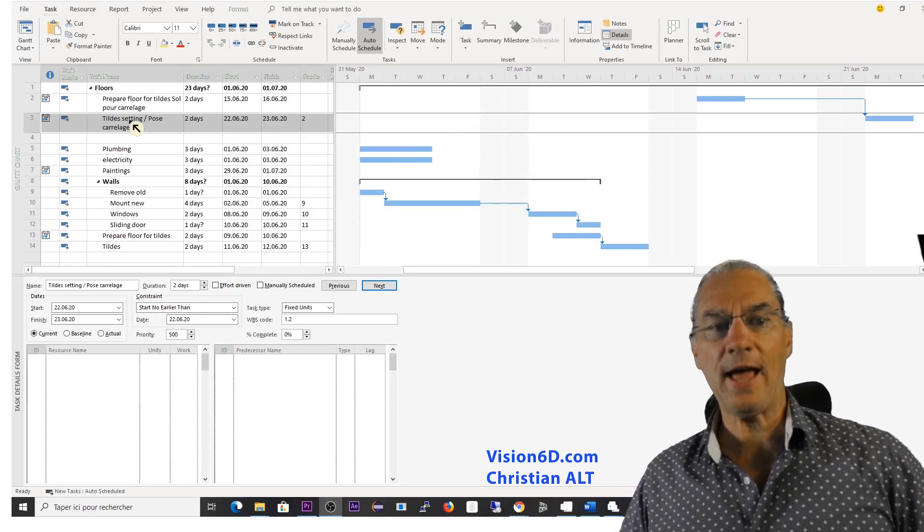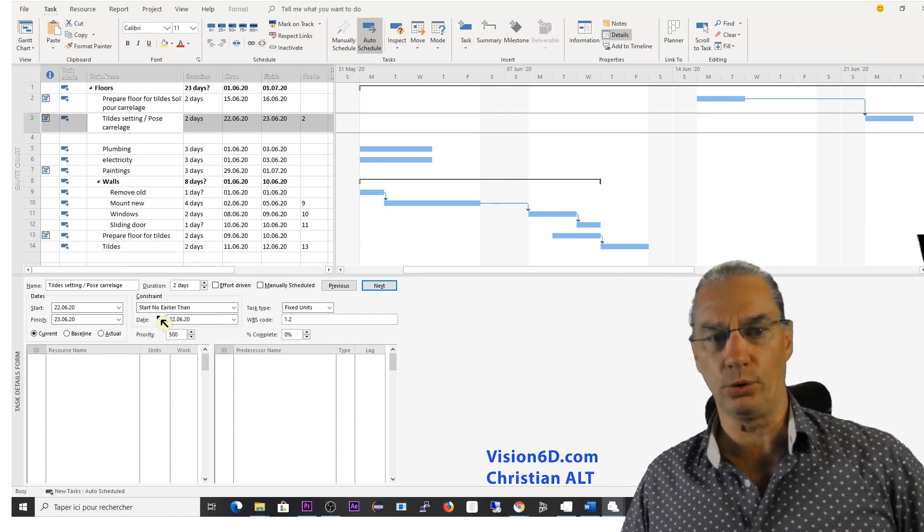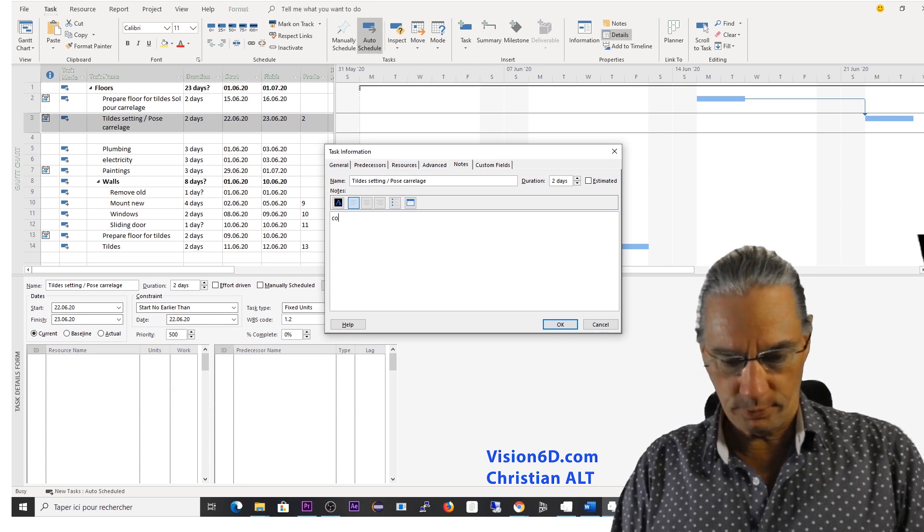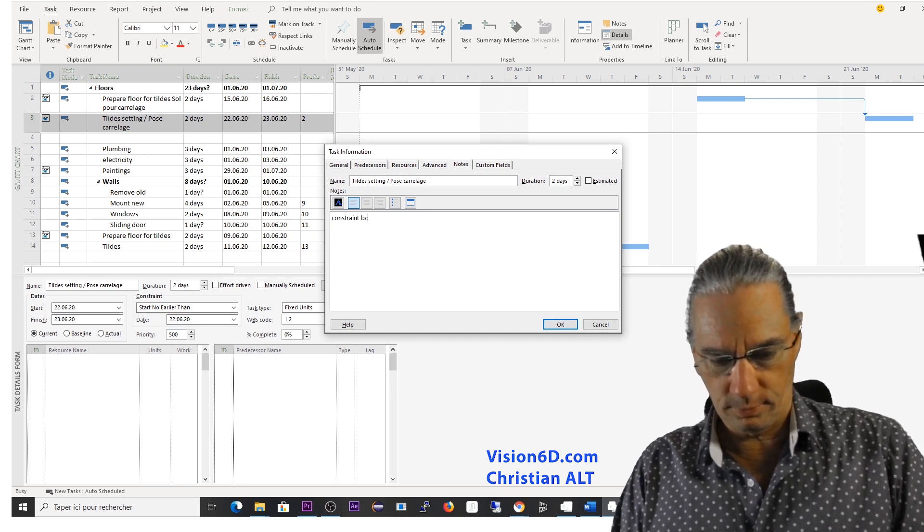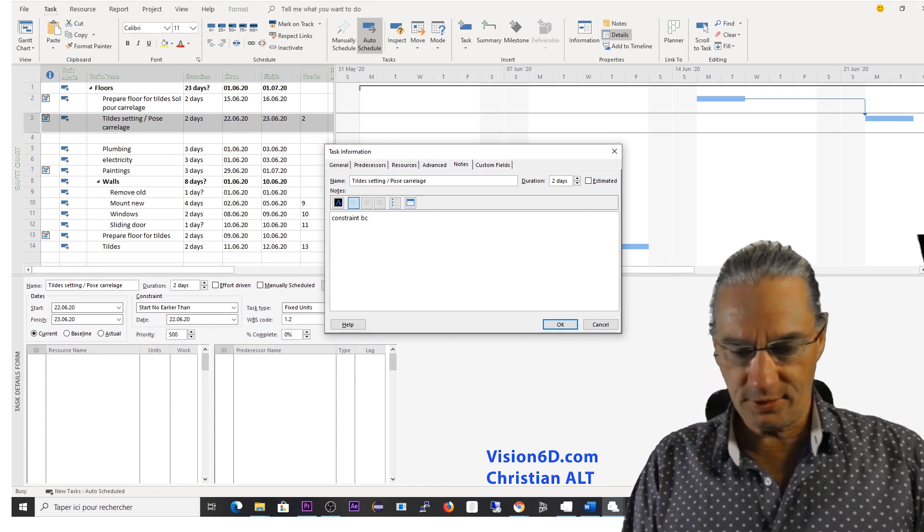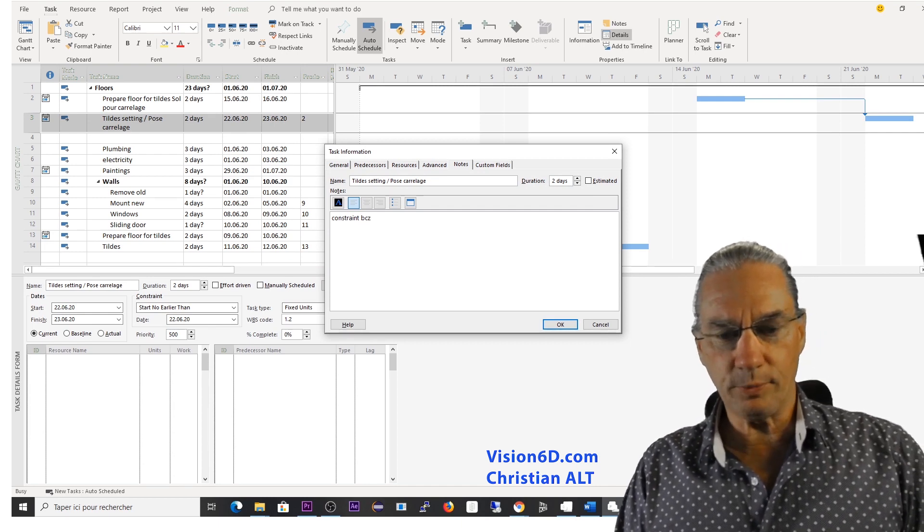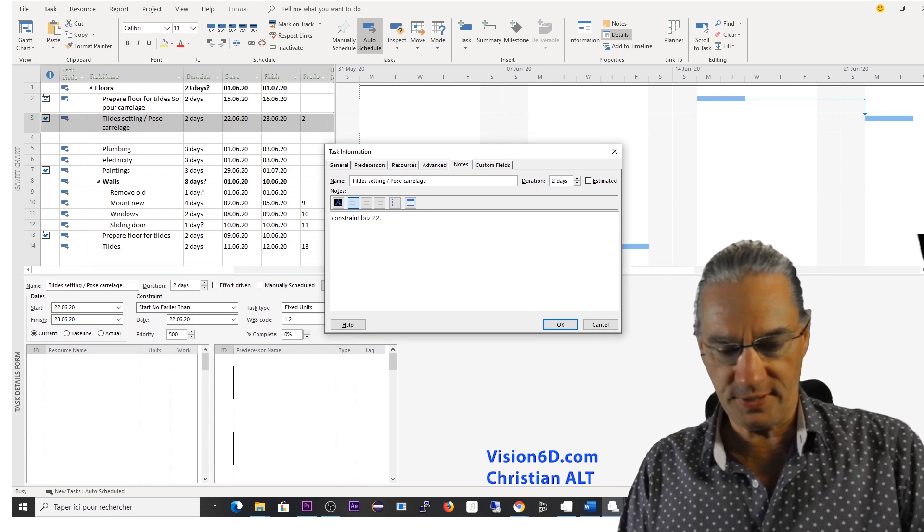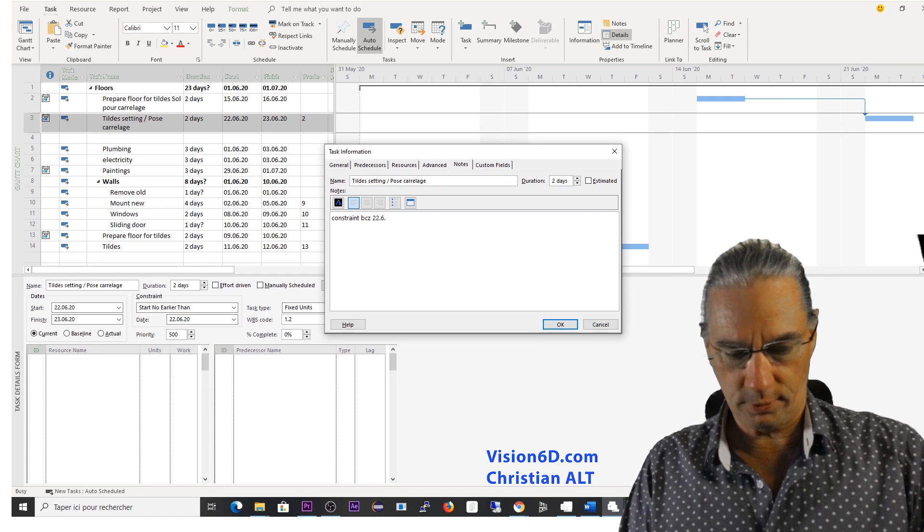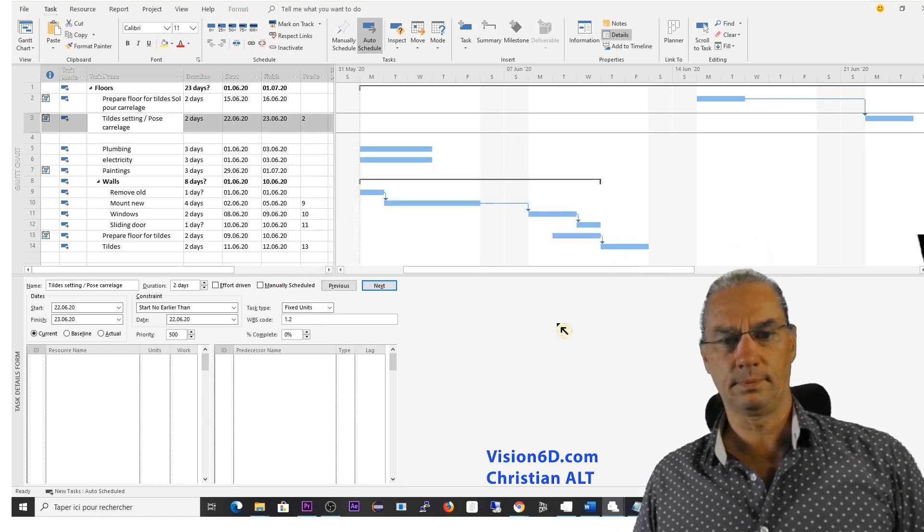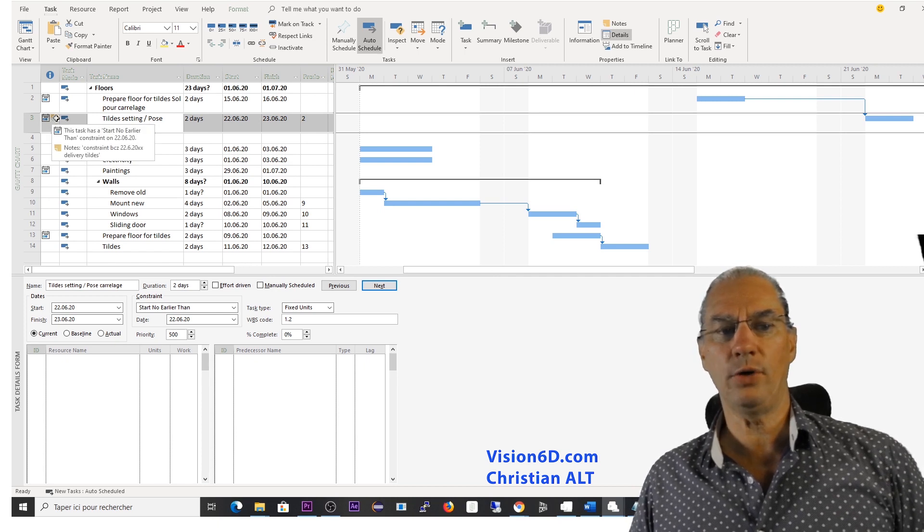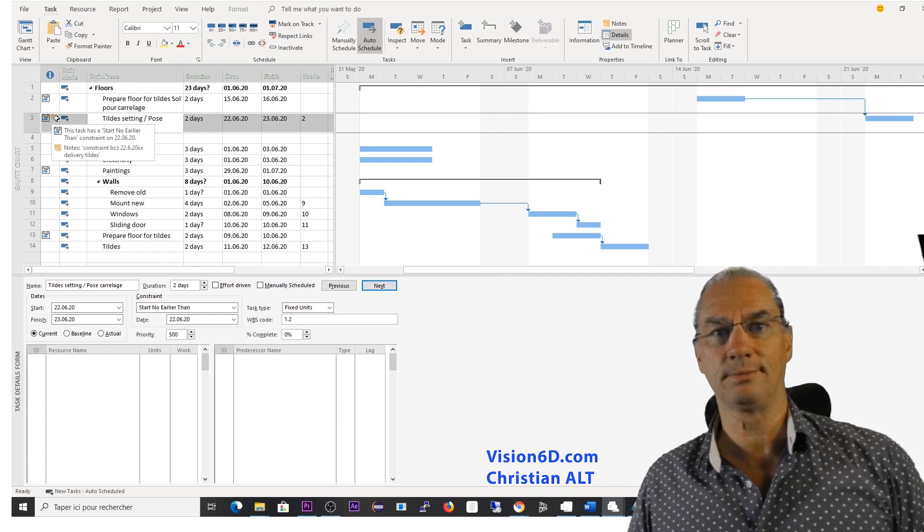So when you have added a time constraint, it's a good habit to add a note to remember that you've set the date constraint because you cannot be delivered before 22nd of June. With that, you know that you have a constraint and you have here an explanation of the constraint.